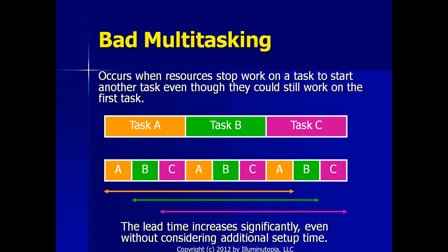And so what happens is the time it takes to do each of the tasks spreads out, like we see here. But actually there's something very significant that's missing here, which is that anytime you switch from one task to another, there is a setup and set down time of moving between them, of getting up to speed for where you left off before and getting ready to do the new task. And actually that time is significant, which we'll see later in a little experiment that we do.